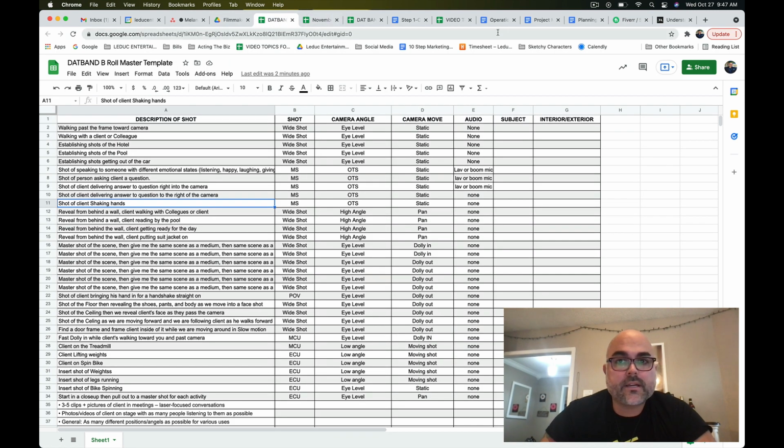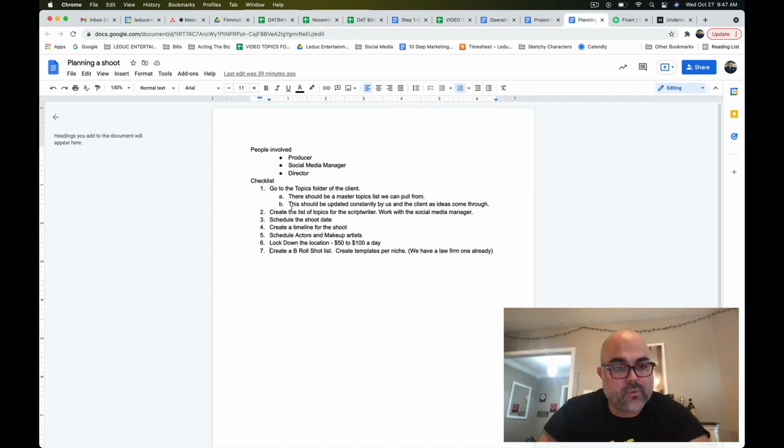Where are we? Okay. So by this point, you guys have gone to the topics folder. Make sure that the master topics is the list we can pull from. We're creating a list of topics for the script writer and working with the social media manager to make sure that they know what the topics are so that when they're putting the stuff out for next month, they know what we have, right? We've scheduled the shoot date. We've created the timeline for the shoot. We're going to schedule any actors or the makeup artists. We know that we need to lock down the location, right?